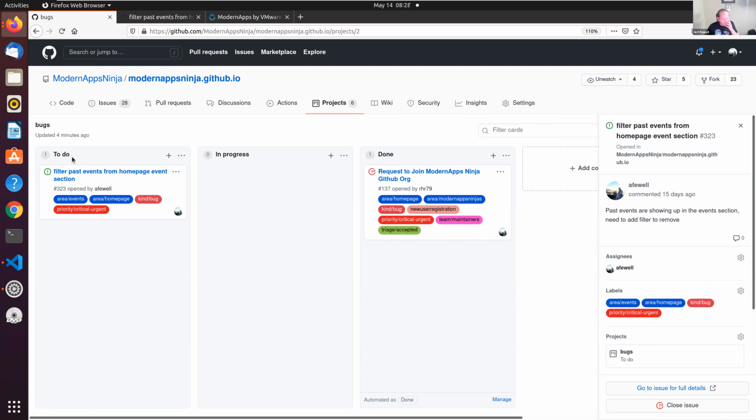It's kind of a weighted fair queue of sorts. You can't always starve out things that are priority 3. And some systems will say, well, before we work on something, we'll call it priority 1. So everything we're working on at that point in time is the top priority, which kind of makes sense from a certain perspective, but I don't think that's valuable. I think it's good to keep good metadata. So I like to keep this column here that says to do, sort of like the next on deck, things we've decided are next on deck, regardless of the priority label.